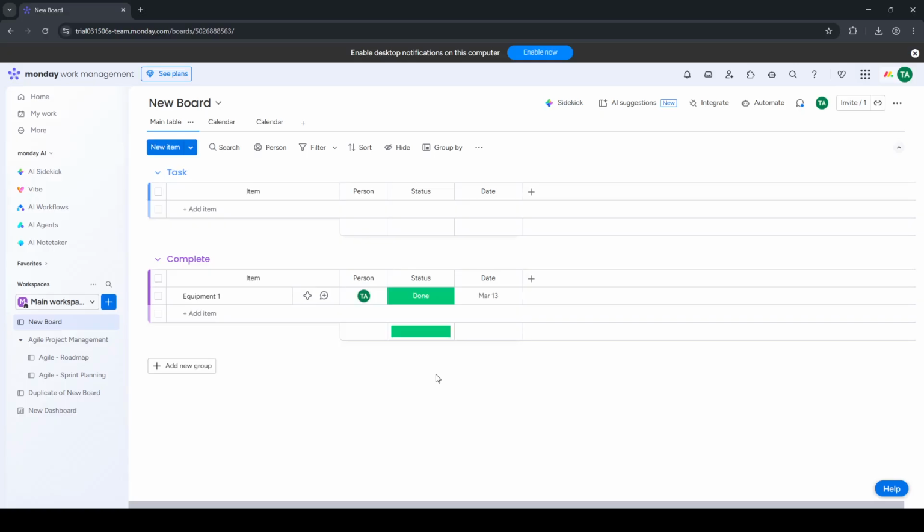First, open Monday.com and head to your trial management board. This is the board that already contains your tasks, owners, and ideally, date or timeline information. You'll find it in your workspace's board list. When the board opens, you should see your familiar table of items in the main view. If your board already includes a date or timeline column, that's perfect. The Gantt view will use those fields to place each item on the schedule.